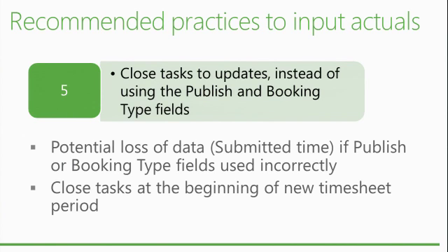Otherwise, if timesheet is not an option, then you have to go back to plan B, the one I was explaining about, using a regular project to store this non-project time and try to limit the number of resources and the duration of the task that you have. But then in the timesheet, will the resource see the task as well? Oh, yes. You will see your assignments, and then you will see the list of all the non-project time that are not assignments but are created to populate the timesheet. So you have them in two places? No, it's in the same screen.